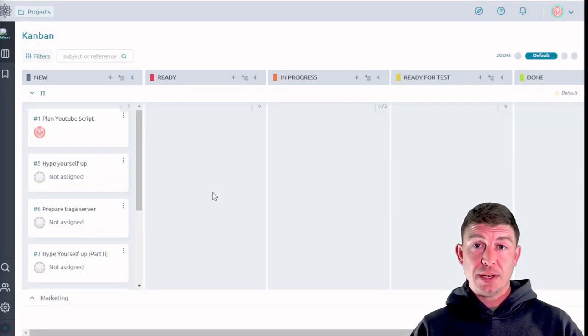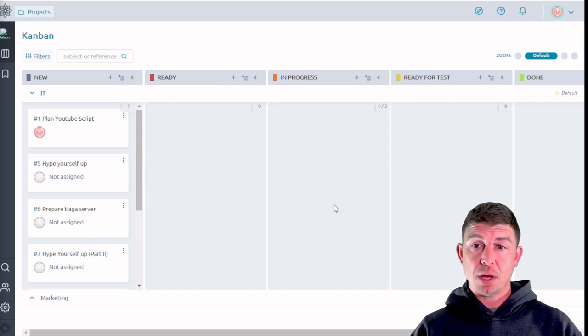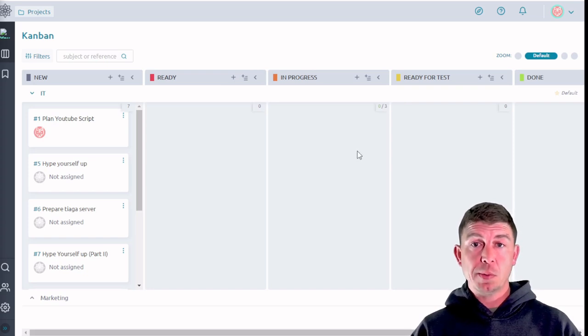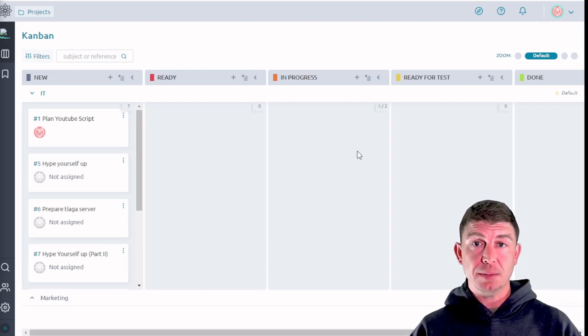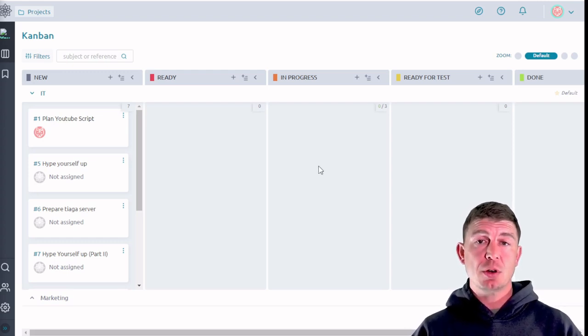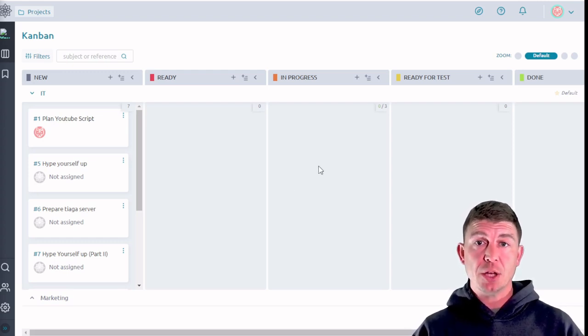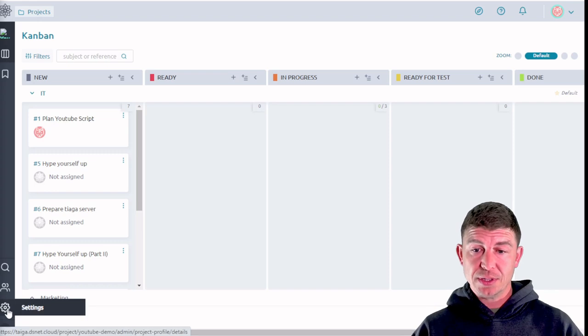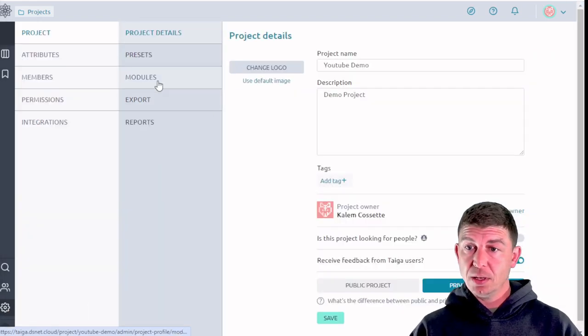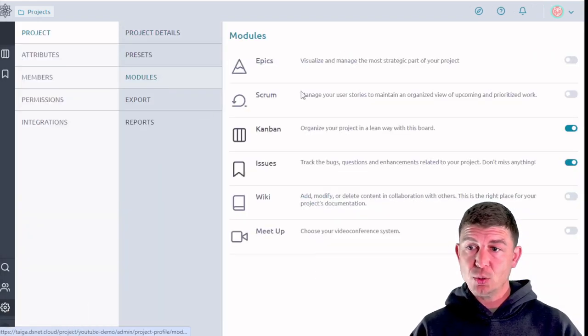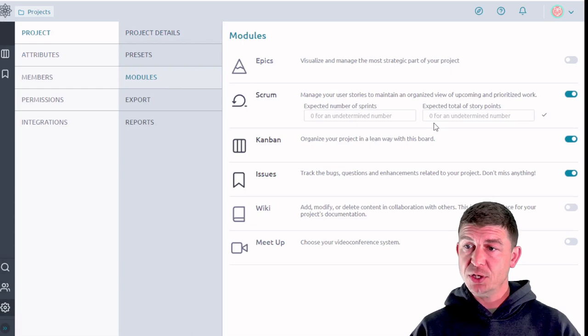All right let's jump right into it. As you can see we're starting from the Kanban board which is where we left off at the end of my last video mastering Kanban in Taiga. The first thing we have to do is turn on the scrum module. So we're going to go down to the settings section, click on modules, and then flip the switch for scrum.